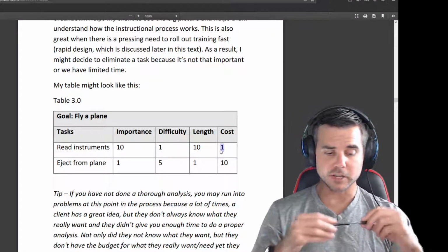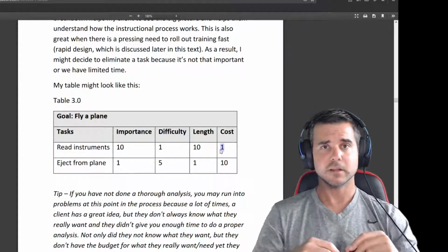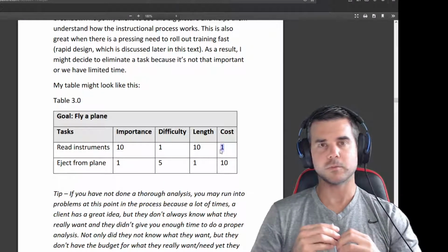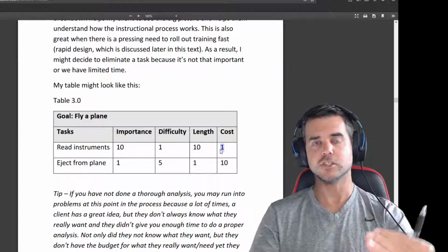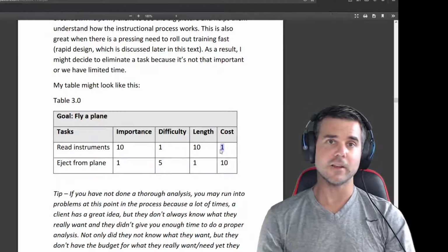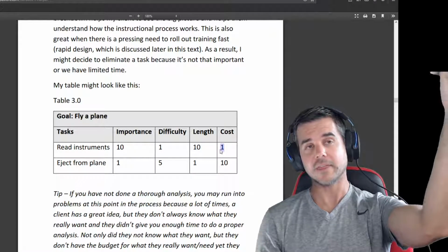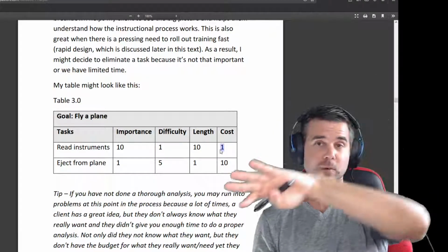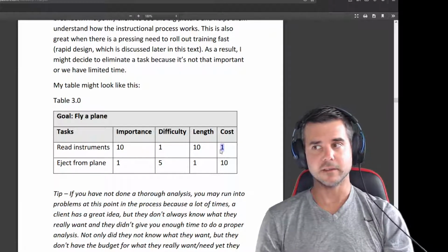So like my current project, I've given them a cost that I think the project's going to cost, but I'm billing them out hourly because it's too much. As soon as someone gets past a very simple, small, like $10,000 project, it's hourly billing, because I don't want to take the chance that they've underestimated too much. And I don't want to give them this huge number of the overestimation that it could potentially cost. So what I usually do is I give them a sample fixed cost, say, I think it's going to cost around this much. Unless we do XYZ, it's going to go up to here. If we don't do XYZ, it might be down here. It's going to take about this many hours to get X done. And that's what I tell them.